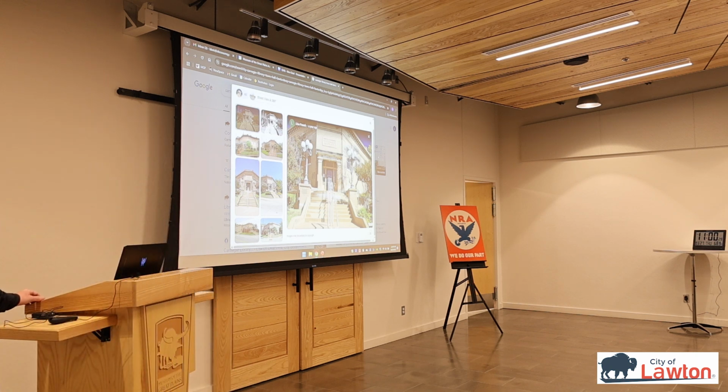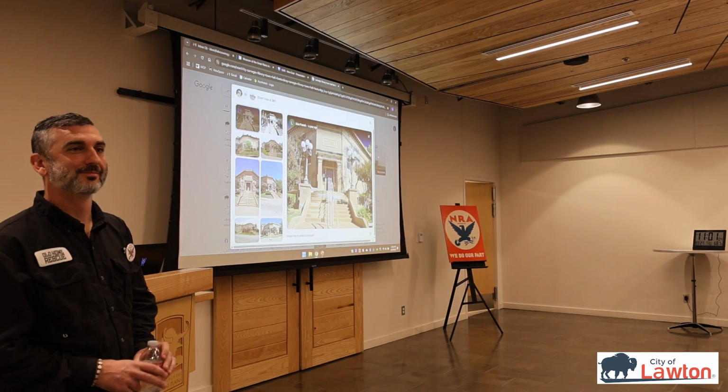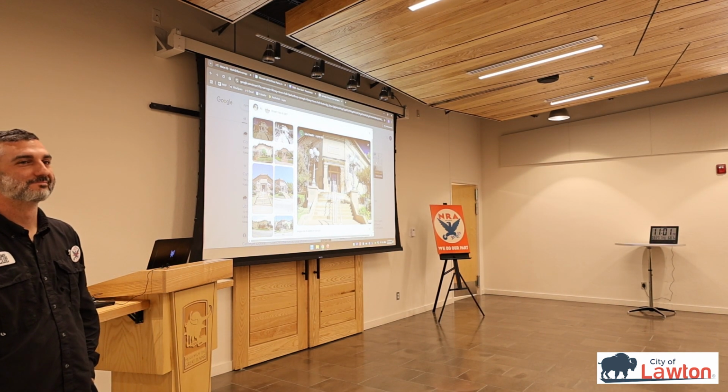So I have a cleaning question, but first off, I want to say thank you for being a sponsor, and you were a sponsor last year too. I really appreciate that. Morgan and his team are working with our house from 1901. It's kind of a Victorian-looking house. And what he mentioned about sometimes having a maintenance line item makes more sense. We didn't have hundreds of thousands of dollars, and we had wood rot issues. So we built it into the budget for, I don't know, $5,000, $10,000, $12,000 a year. And he comes in and fixes and spot checks the most important things until the day that we can save that big money. So that was a very smart and valuable approach, and it worked with our city management. So I want to mention that.